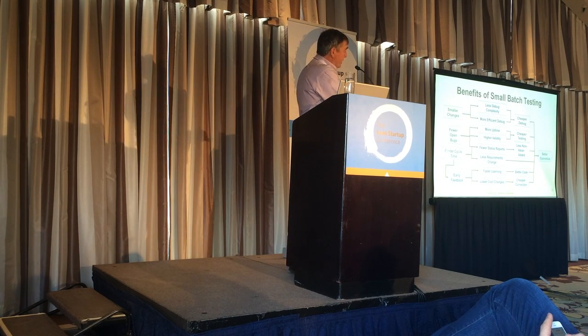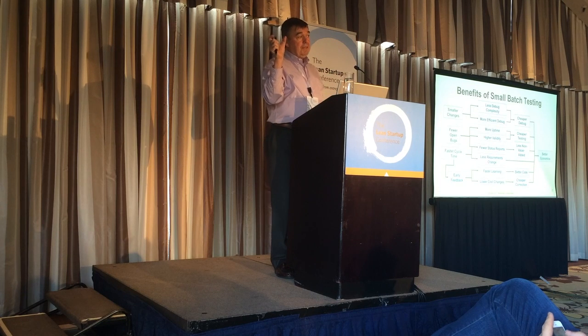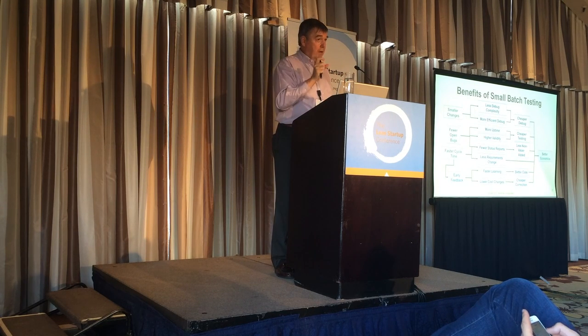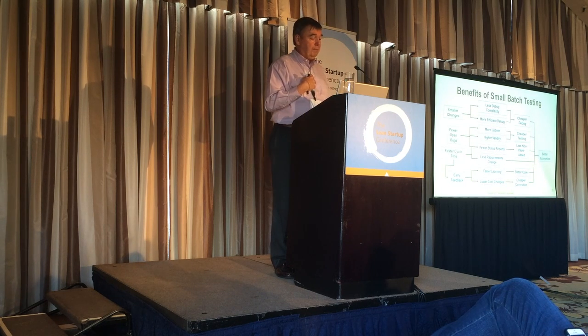With a faster cycle time, the less time your product is in flight, the less requirements change you experience. And in fact, this is an exponential problem. Requirements change goes up exponentially with the time in flight, for reasons I don't have time to explain. But you get a huge reduction in requirements change when you have a faster flow through time in the process.